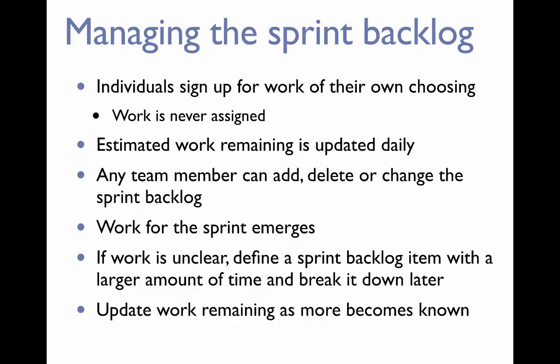The estimated work remaining is updated daily. That is on your little cards. Every day you note down, did so much work, I think this card still takes so and so long. Any team member can add to, delete, or change the backlog. You just have to inform your colleagues. And that way, as you're working on the sprint backlog, you have an idea of what work actually has to be done during the sprint.